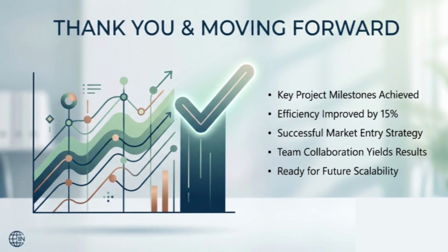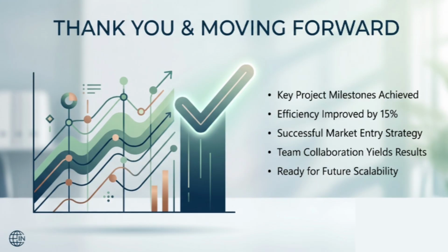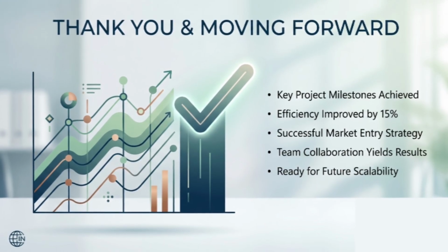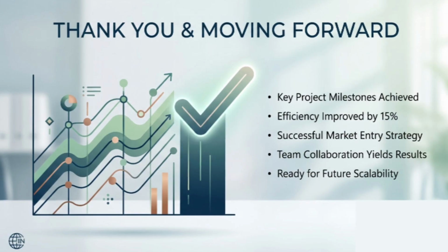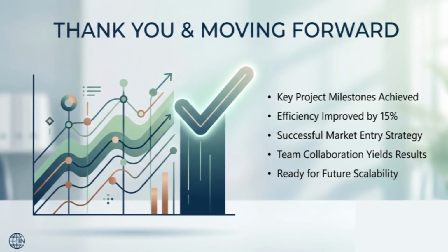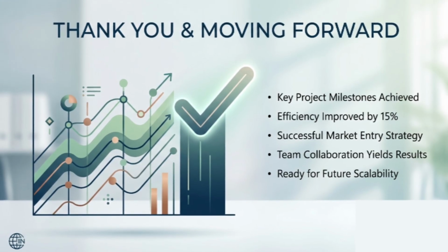Many high performing agile teams actually use both, a burndown for the daily stand-ups to manage immediate tasks and a burnup at the macro level to keep stakeholders informed of the overall release progress. Ultimately, data is only as good as your ability to communicate it. Choose the chart that tells the right story for your audience.